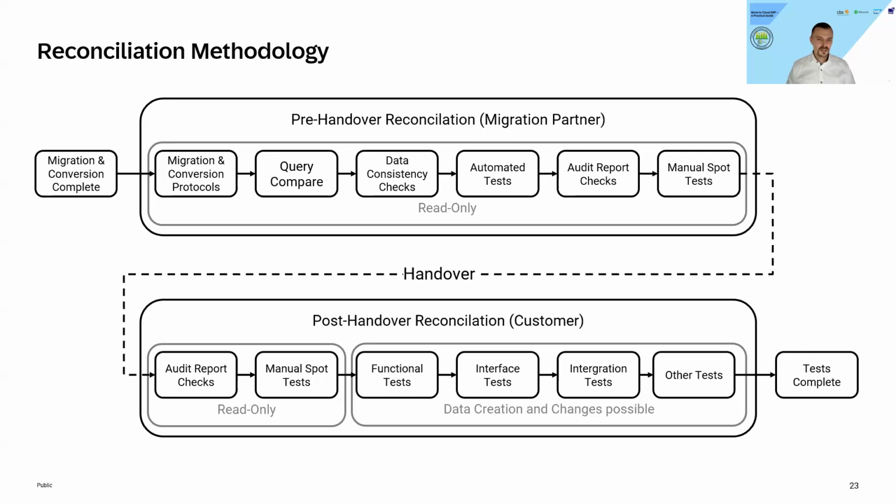So having this handover, Dominik, what comes next then? Okay. So basically, the handover of the manual spot checks originates already in the blueprinting phase, when together with the customer, we determine what the test plan and the test procedure are. And typically, customers do have recommendations: this is what I typically would check.